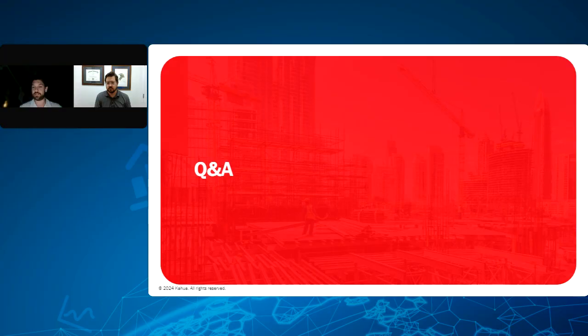Basically, there's a cadence. A project manager might log in, reconcile their costs for the month, do some projections on the cash flow in the cash flow tool, and then the analytics tool is reporting that out and showing you the cash flow that the person projected. There's automated curves and things like that to simplify the work for people, but that's the basic capability is managed in the cash flow tool. And if you would be interested in seeing more about the cash flow tool, definitely reach out and we can schedule time to show that as well.